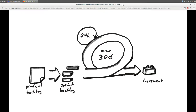The whole thing looks roughly something like this: in two weeks you're doing a big circle where at the start you're having a sprint planning meeting, going through things you're adding to your sprint backlog, making sure they fit within the empirically determined capacity your team has in story points. Then you do cyclical daily development with stand-up to check in, and at the end you do a demo showing what you've built, and usually also a retro where you look at your processes and ask how you can be more efficient going into your next iteration. So you're constantly improving.